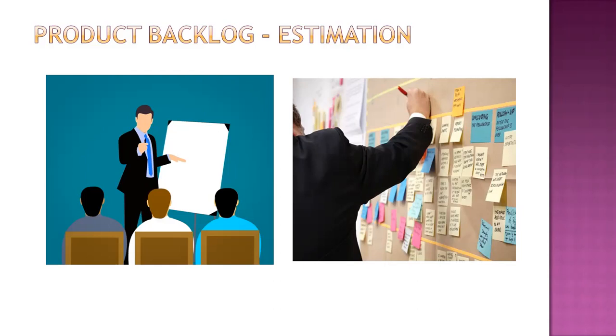Now go to business and say, this is going to take 2 sprints and this is going to take 3 sprints. As we have only 2 more months in our hand, it's highly impossible to take advanced search. The reason being, we have other important features also planned. So let's not pick up advanced search. For the first release, let's go with only basic search. So now you really have a logic to convince the business on the scope that you need to work on.